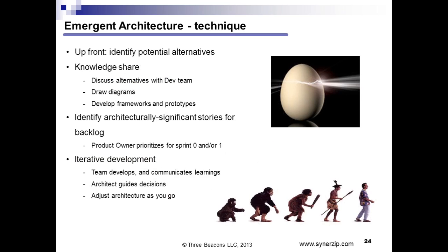Yeah, there's a common term called sprint zero, which is intended to do some planning, do some upfront architecture and design work, to help ensure that sprint one is more successful. So, yes, I would say, if your team uses that concept, sprint zero is kind of a bucket or placeholder for some upfront discussions. But you may be working on a project or software system that's simple enough that you really don't even need a full 2 weeks to move the yardstick forward on the architecture and design well enough that the team feels confident to get going into pure coding. But yes, generally that would be done in sprint zero.